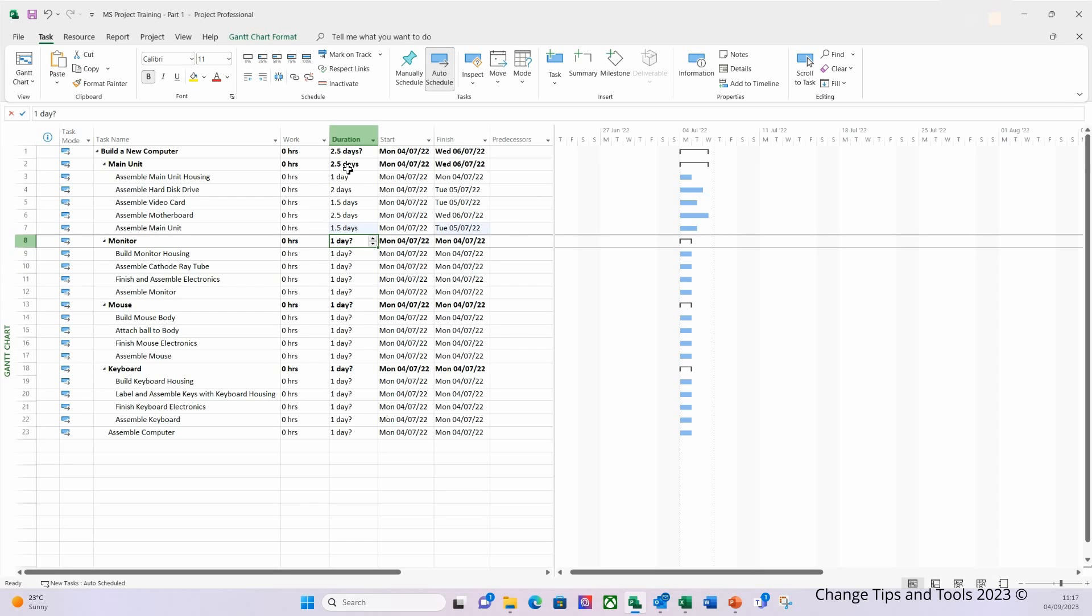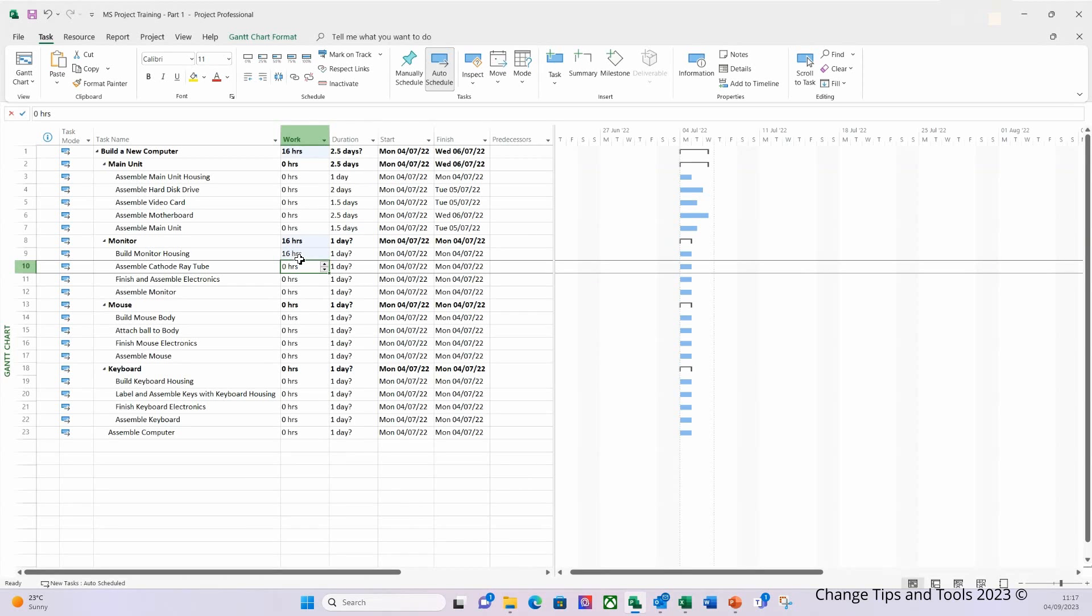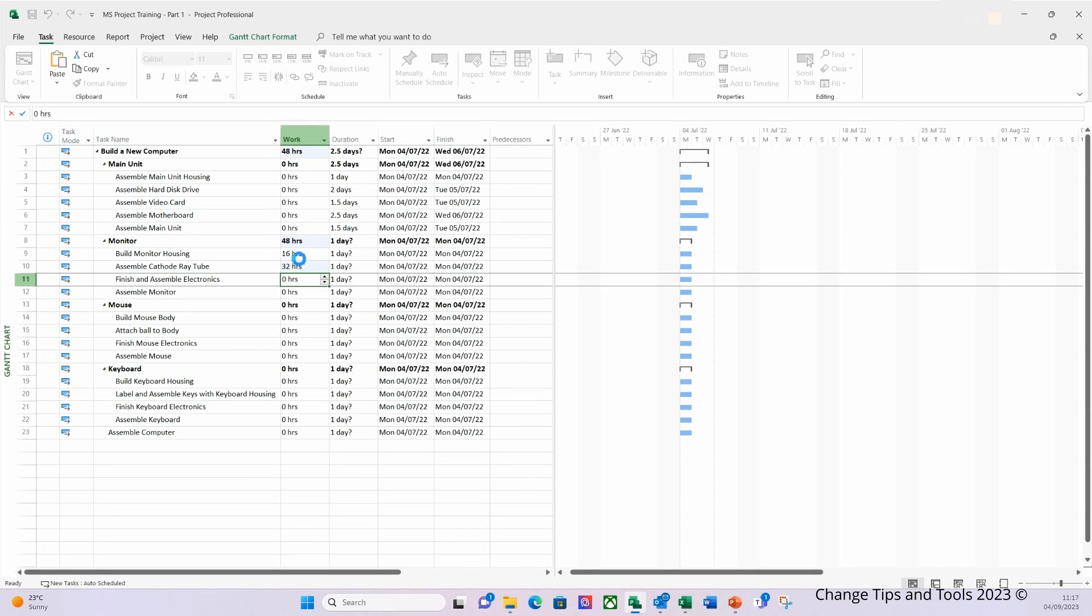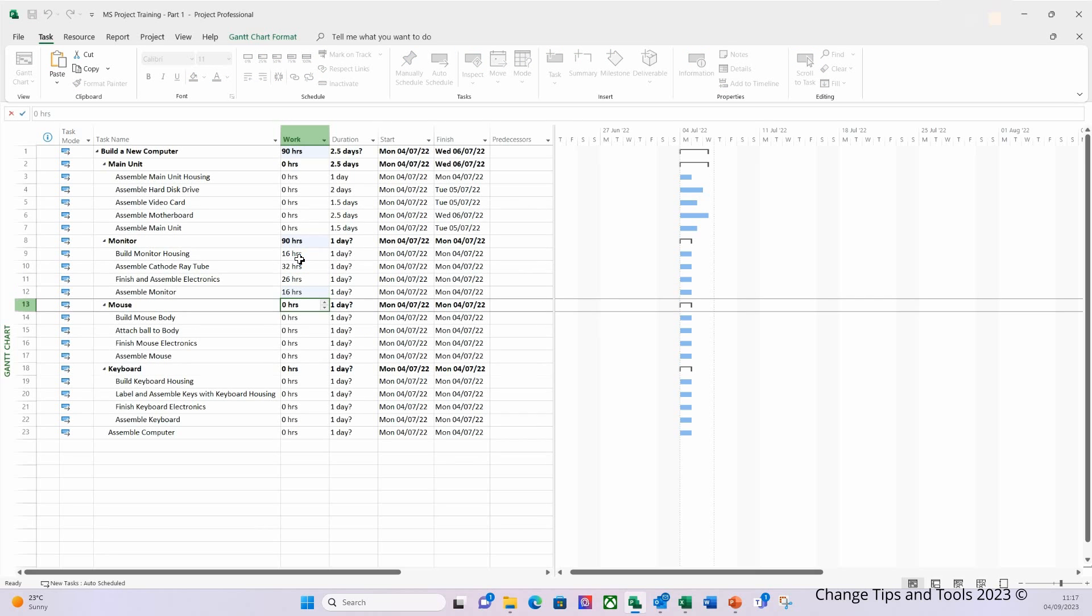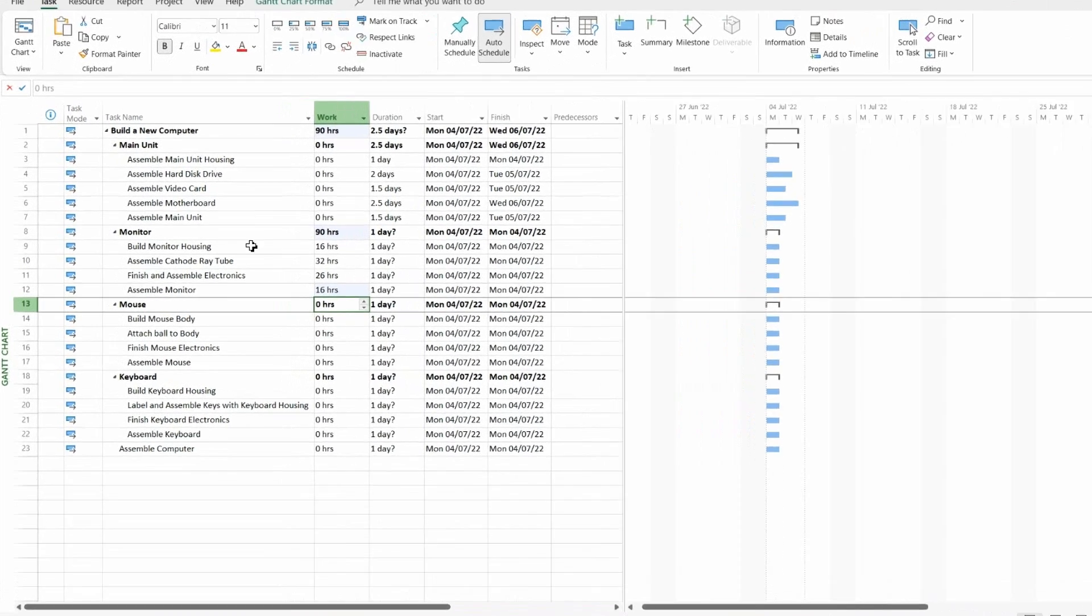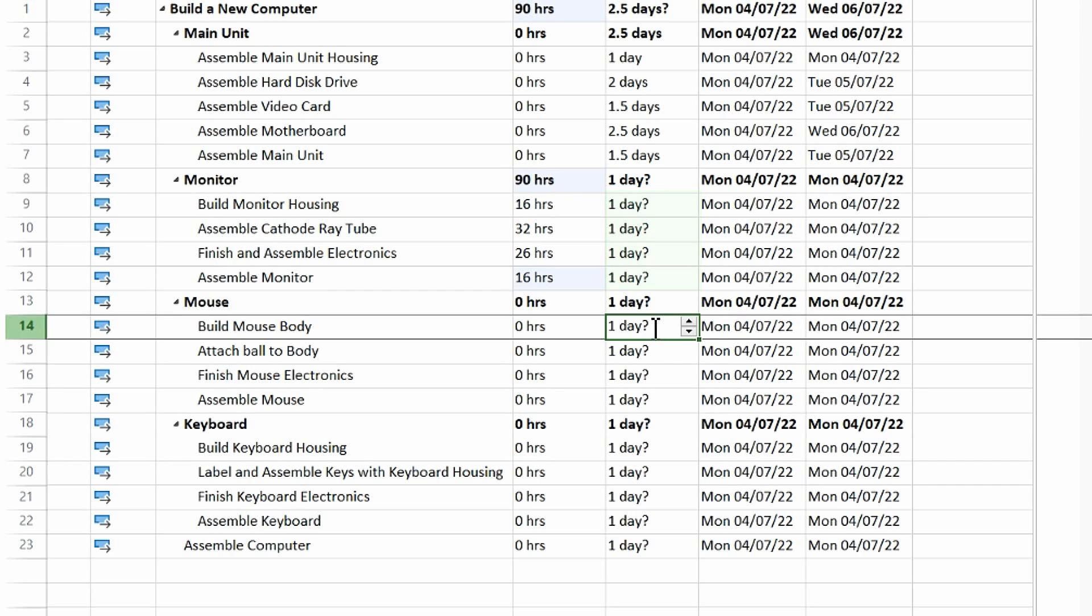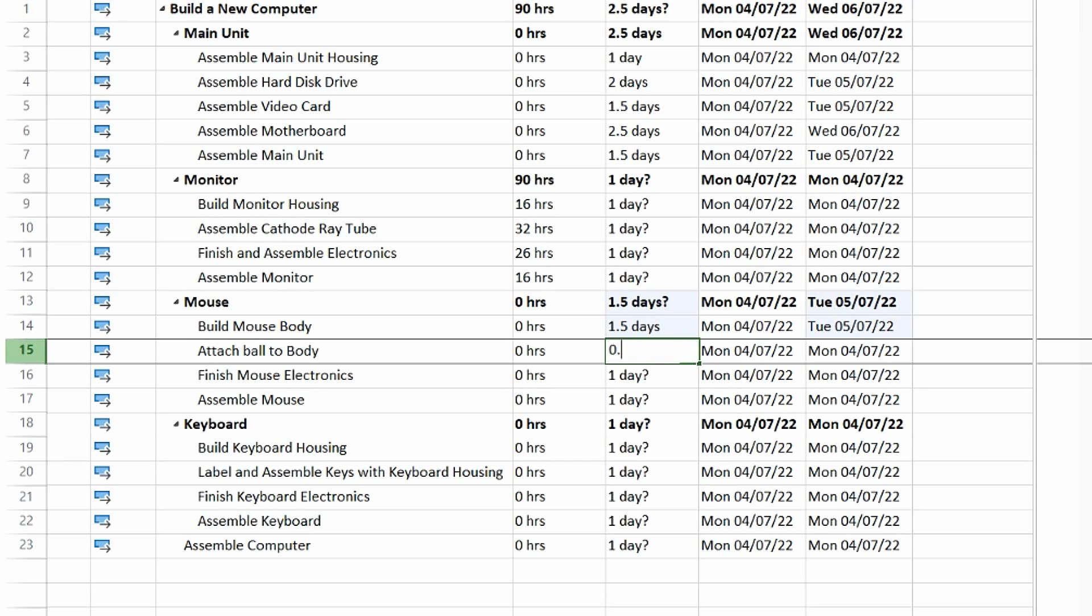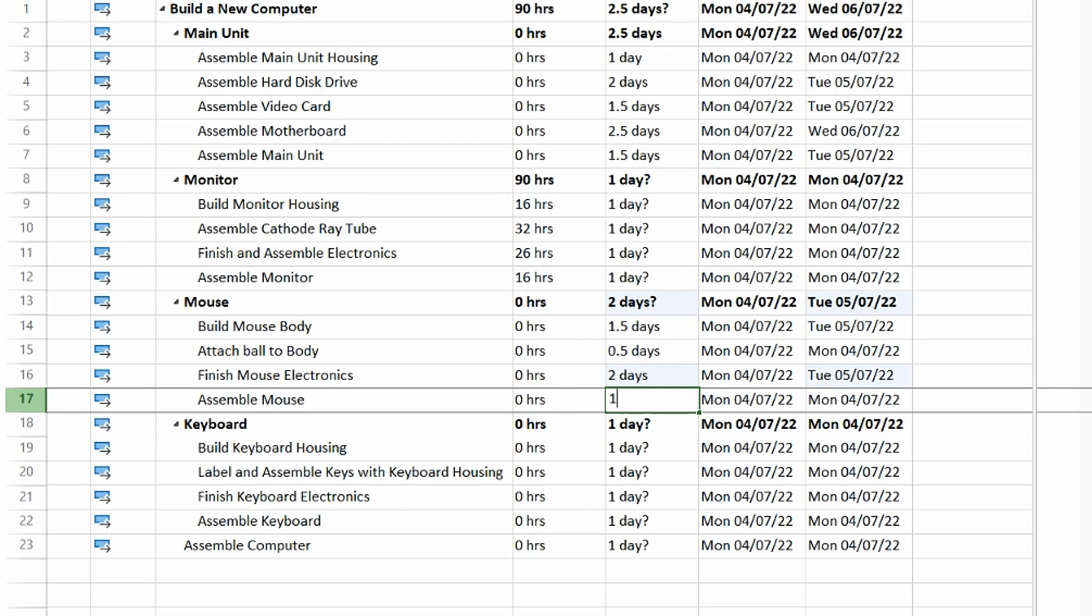Next I'm going to enter some work based estimates for the monitor. Now hopefully in the real world it wouldn't take this long to build a computer. I'm just doing this for demonstration purposes. And again what you can see is that the work for the monitor has calculated based on the hours that we've entered here. However the duration has not calculated because we've not entered any resources. I'm going to now quickly enter some values for the mouse and keyboard.